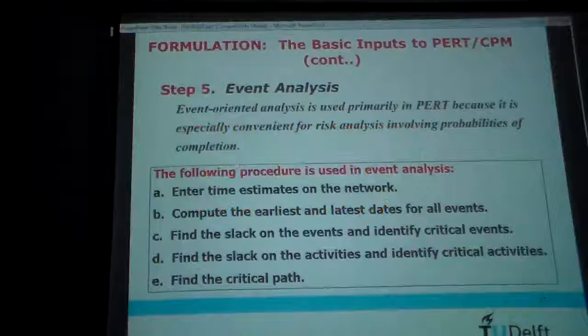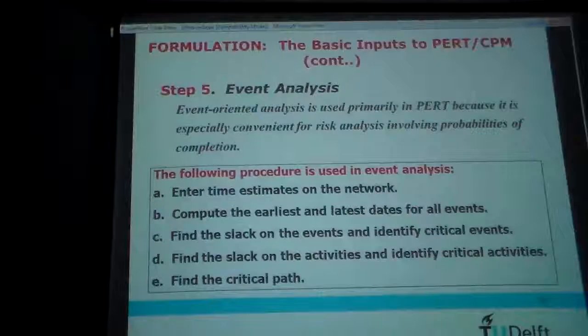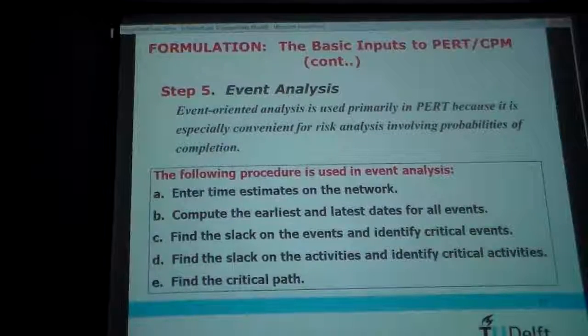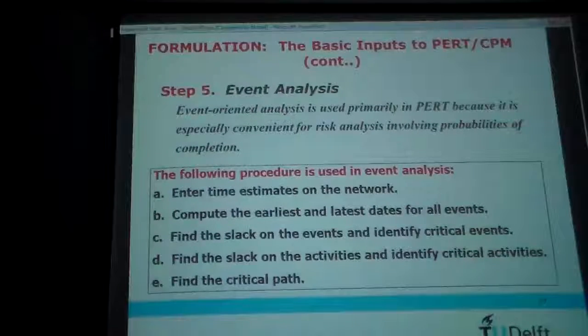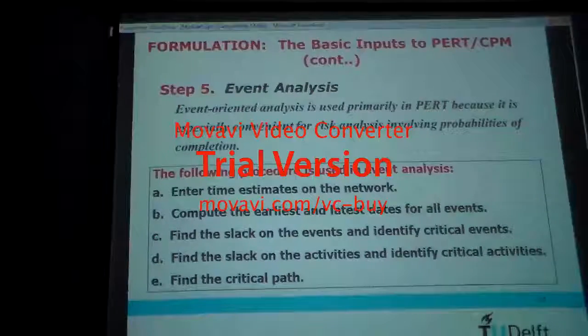The following procedure is used in event analysis: enter time estimates on the network, compute the earliest and latest dates for all events, find the slack on the events and identify critical events, find the slack on the activities and identify critical activities. All this we can take from this table. Step five — how to get this one, how to get the control. There is some algorithm.